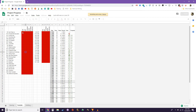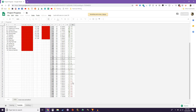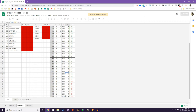I would go ahead and film a bunch and mark them here. Over on the side: date, how many component steps are filled in, how many I did that particular day, what percentage I am completed, and then the goal — like 10 steps done or 7 steps done that day. It turns more green when I'm farther ahead of schedule. Then there's the projected finish date. Certain videos couldn't be filmed until something else was done or until a certain date, so some days show zero because there was nothing I could do. I changed the goal numbers based on different totals until I got to where I could finish everything at 100%.